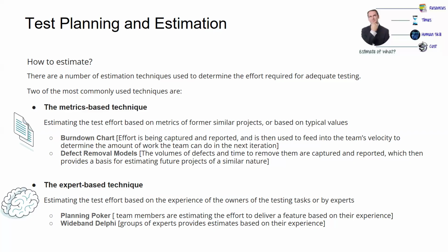So we have some details on the previous project where we did something similar. So we can use that attribute and we can determine this much effort will be required for this, right? We have done web-based application testing previously, right? Now we come across a new testing activity for a new web application and we see, okay, for this one we have taken this much time. This application seems to be a little bit more complex than that.